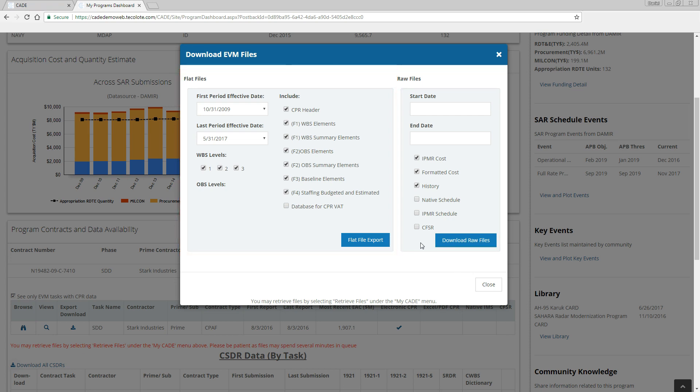Each file format has its advantages. Formatted Excel files are human readable, but often difficult to do analysis on. XML files are designed for machine-to-machine data interchange and not human readability, which makes them challenging to work with. Flat files are designed to give you the most analytical power and flexibility.